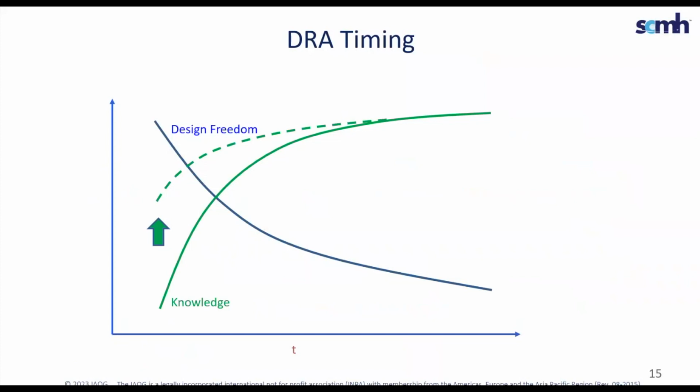Now, as the design matures and changes, the DRA is updated to identify and address any new design risks. Then as a new product is moving into production, the DRA is finalized at transition to production as a deliverable as part of the production part approval process, or PPAP.